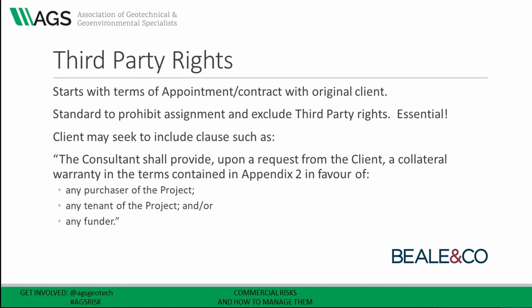Let's now look at how your appointment should deal with granting rights to third parties. It is standard nowadays that your contract would include a clause that expressly prohibits assignments of your liabilities without your prior consent, and would also exclude third party rights under the Contracts (Rights of Third Parties) Act. Without that prohibition, your client could assign the benefits of that contract at any time to anyone without your consent, and need only notify you after the event.